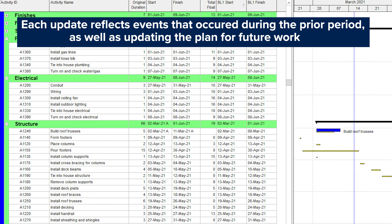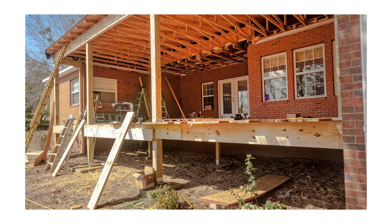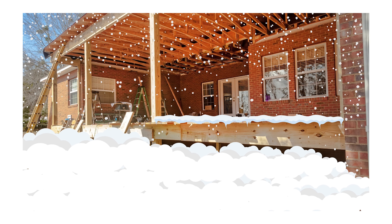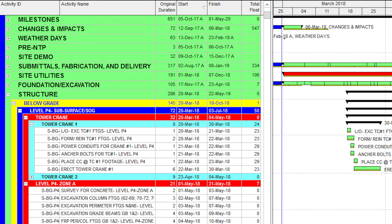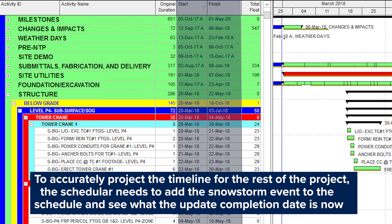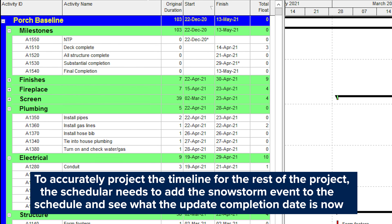Each update reflects events that occur during the prior period as well as updating the plan for future work. Let's say you're constructing a new screened-in porch. The project is progressing along when a major snowstorm passes through and a foot of snow accumulates on your job site. A week's worth of progress was lost because construction was shut down following the storm. To accurately project the timeline for the rest of the project, the scheduler needs to add the snowstorm event to the schedule and see what the updated completion date is now.